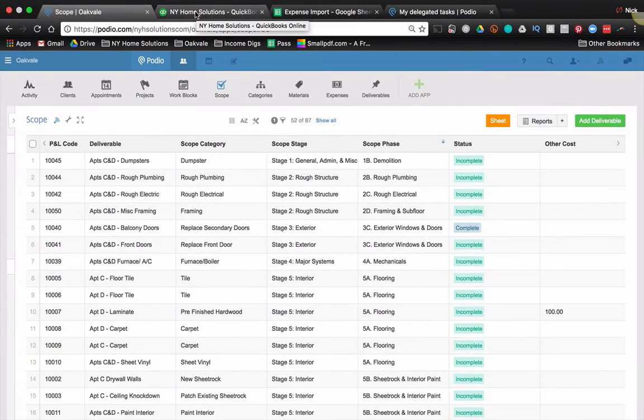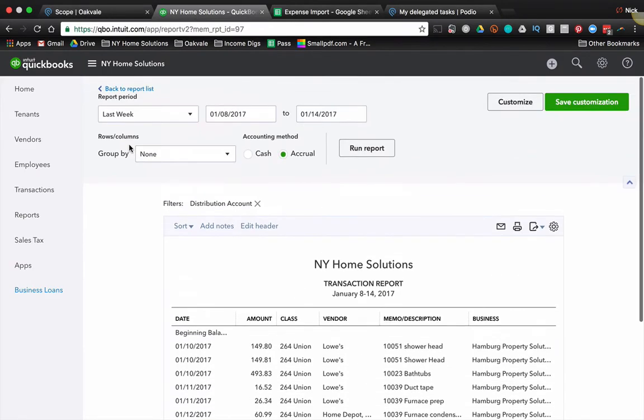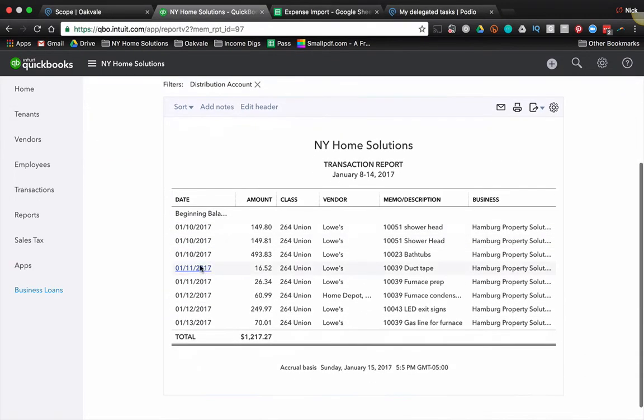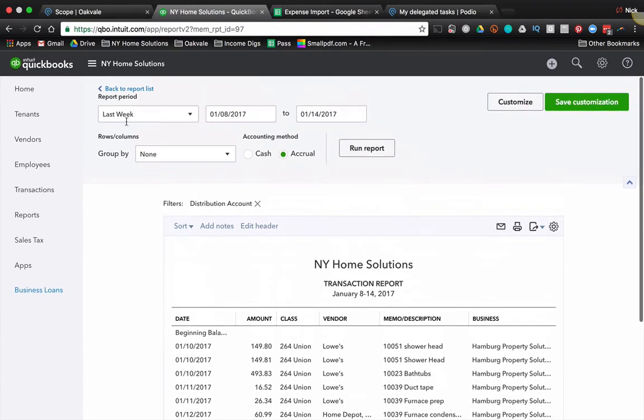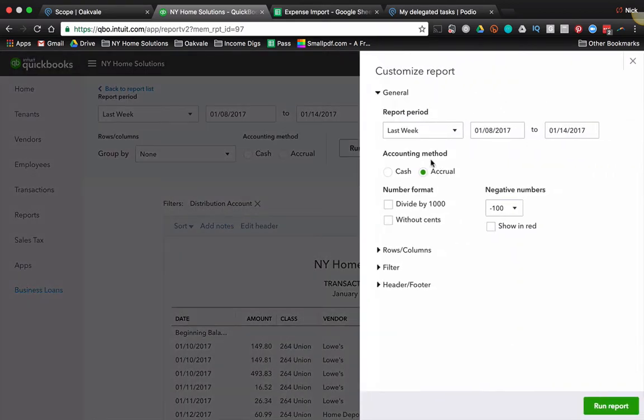So I'm going to switch over to QuickBooks. And what I've done is I've created a report that lists all of the expenses for CapEx for the past week. And basically I've built this process wherein every Sunday or Monday, I'll go and actually my VA will go and run this report, which grabs all of the expenses for the past week that relate to a project. And that's done through some simple filtering.